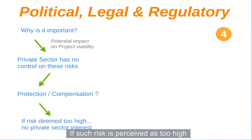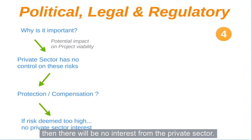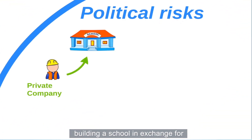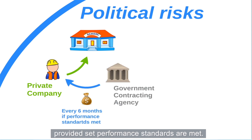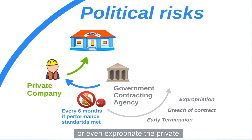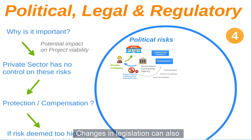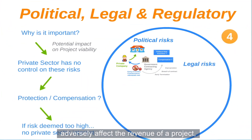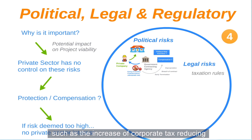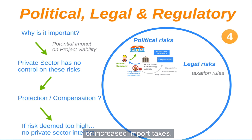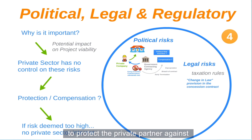For example, consider a private company building a school in exchange for regular payments from the government, provided performance standards are met. The political risk is that the government may decide to terminate the contract or even expropriate the private company without adequate compensation. Political risk insurance is available to offer a solution to this issue. Changes in legislation can also adversely affect the revenue of a project — such as an increase in corporate tax reducing net revenue of private sponsors, or increased import taxes. Often, a change-in-law provision can be included in the concession contract to protect the private partner against the impact of future changes to legislation.